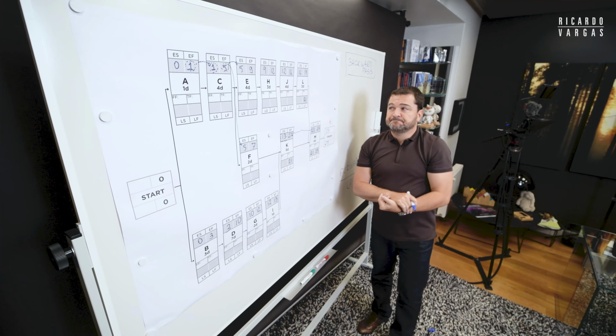But now we have the same problem. Remember, on the forward pass, F and I picked the large one, 7 and 13, I picked 13, remember? Now what I need to do, imagine now C. C has two options, 11 or 7, right? Because now I'm going on the other side. So which number will come here? I have two options, 7 or 11, this and this. Which one goes? Always when you are on the forward pass, you use the largest. On the backward pass, you use the smallest.